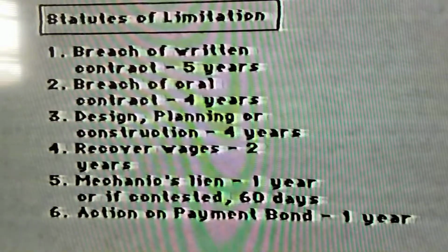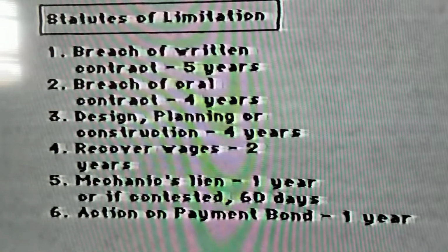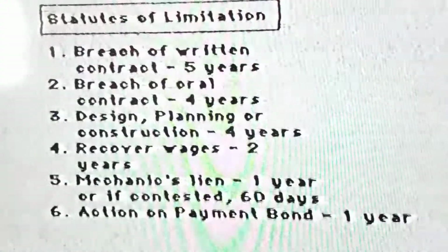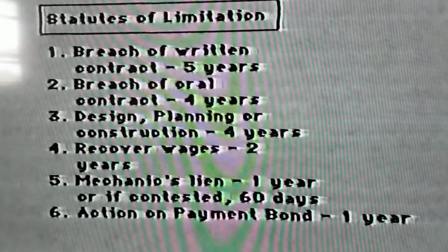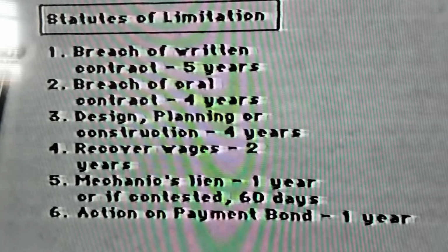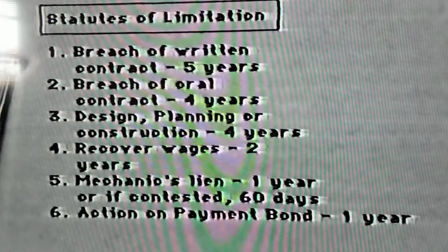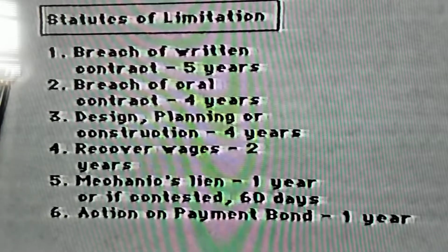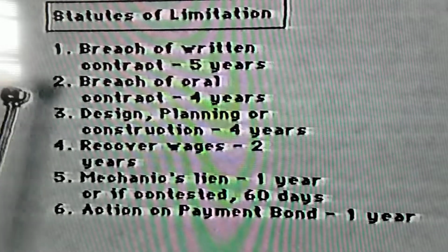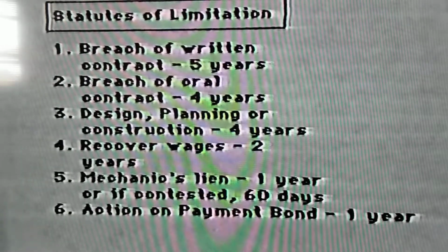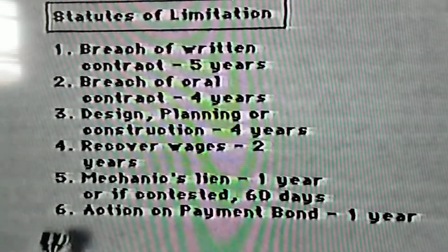The next exhibit, General Contract Law 2, has some other features of interest. The first one in the upper left-hand corner refers to the Statutes of Limitation. Here is another example of a statute imposing rules on the contractual relationship. And essentially this says that certain types of contracts expire if they're not acted on within a certain period of time. And they're listed here 1 through 6.